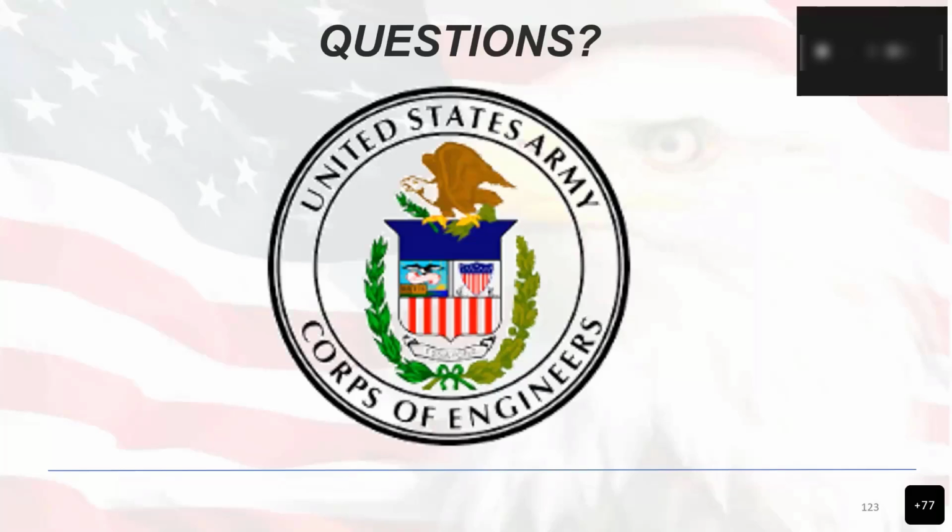Yes, I certainly am. Thank you for the good question. So this is a very important function because this will reduce your workload. The key thing is to make sure that the full contract number with delivery order is in the WBS band name of P2. So when we import the P2 projects, if it sees the contract WBS band, RMS will grab a hold of it and automatically link it up to the contract with that contract number.